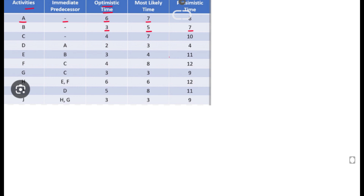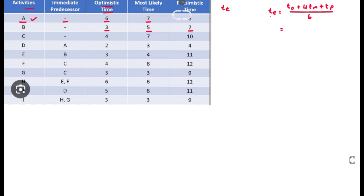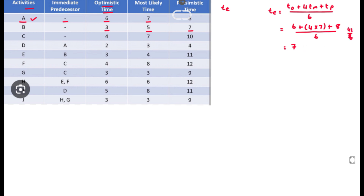Now we can find the estimated time TE using the formula: TE = (T_optimistic + 4 × T_mostlikely + T_pessimistic) / 6. For activity A: (6 + 4×7 + 8) / 6 = 42 / 6 = 7. So the estimated time for A is 7.